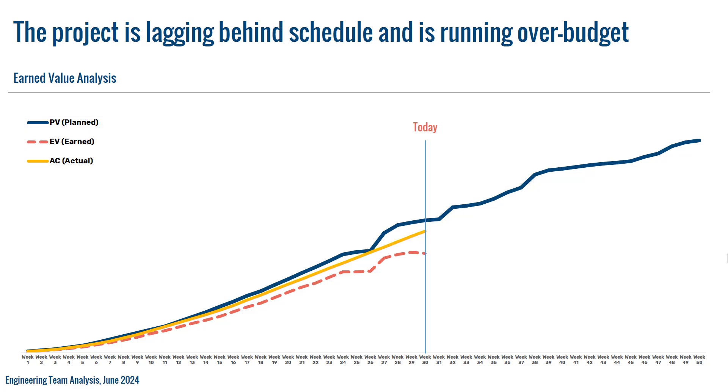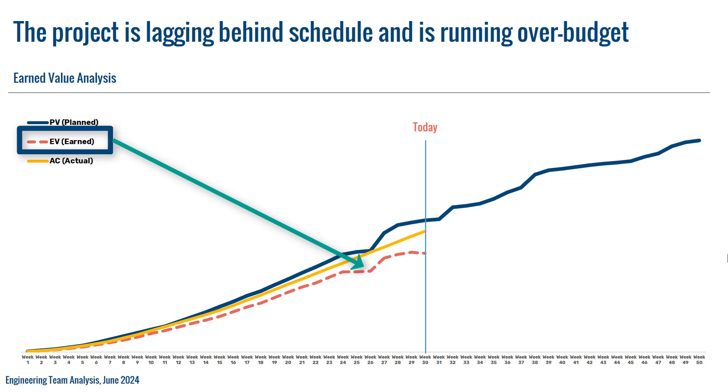Number two: we have Earned Value or EV. It is the value of work actually performed up to a specific point in time, measured in terms of the approved budget assigned to that work. It reflects the amount of work that has been completed compared to the budget.